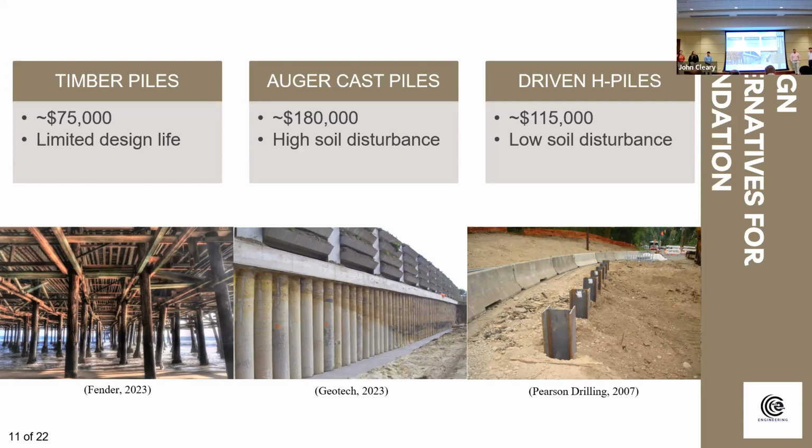And can you build a Florida I-beam in Missouri? So that's why we say it's on shipping costs. They would have to be shipped from, I think, the most local place, North Alabama, where they can be made. But there's no local steel mills near that area either, so anything that would be used would still have to be shipped.